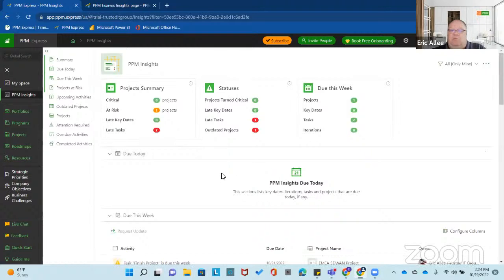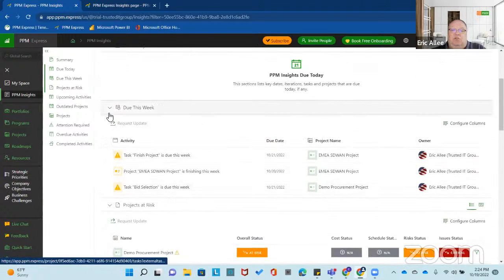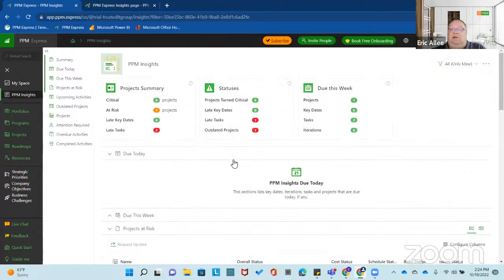So there is some flexibility when you're in the automated mode. You can also go into a full manual mode, right? But that has to be set. It has to be actually selected by the admin for everyone or for a project. They can do it at the project level. Then you'd be in a manual mode and you would be maneuvering, let's say, percent complete would be more subjective. I think we're about 22%, so I put it at 22%. When you're using automated, your schedule and things are done off timesheets and those other capabilities built within the system.